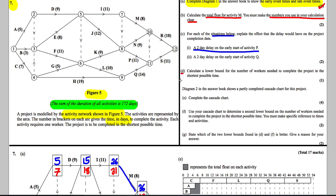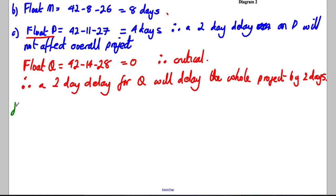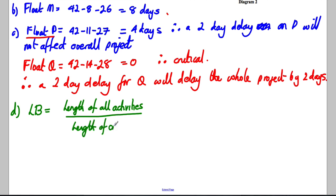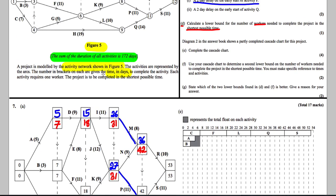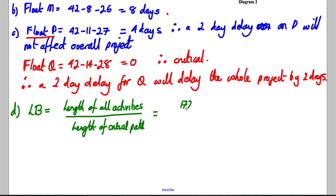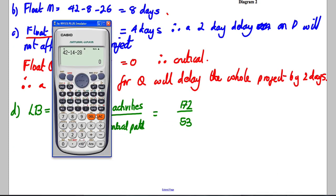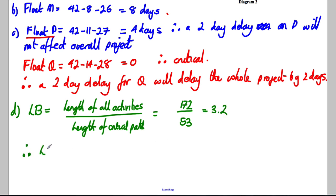For part D, calculate a lower bound for the number of workers needed to complete the project in the shortest possible time. The lower bound equals the sum of all activity durations divided by the length of the critical path. The sum is 172 days, and the critical path is 53. So 172 divided by 53 = 3.2, therefore the lower bound is 4 workers, because you can't have 3.2 workers so you round up.